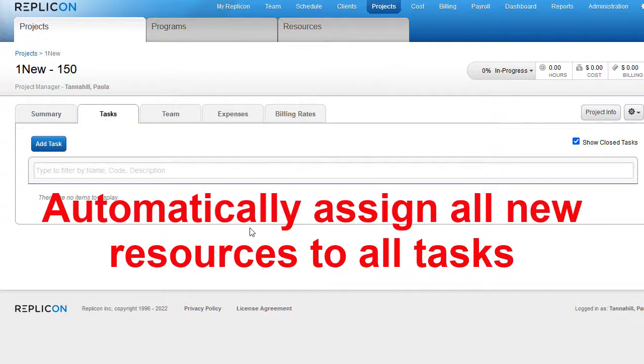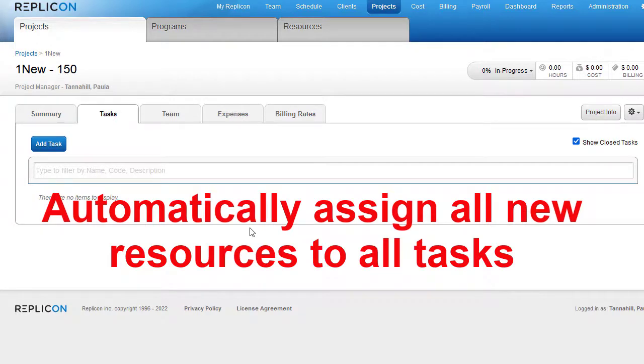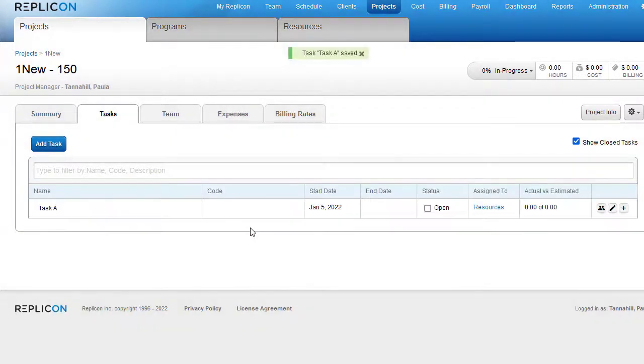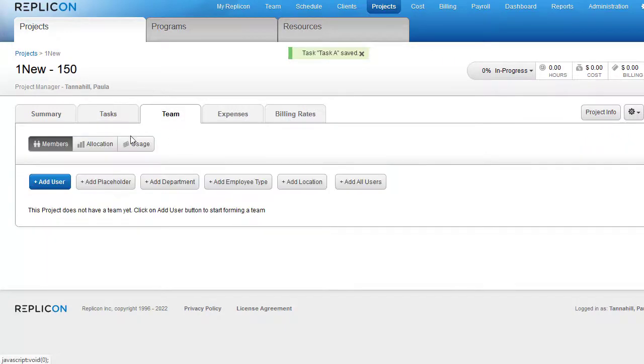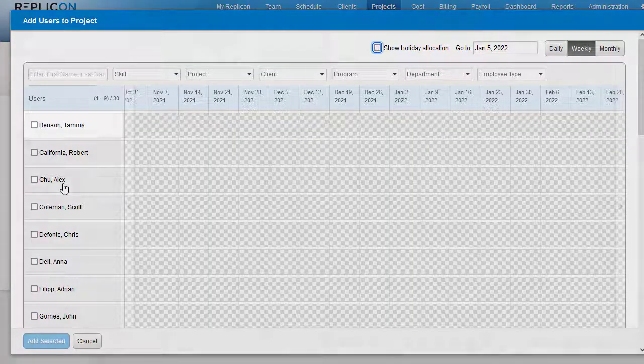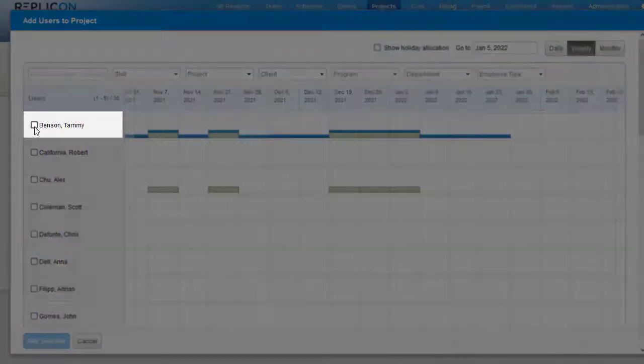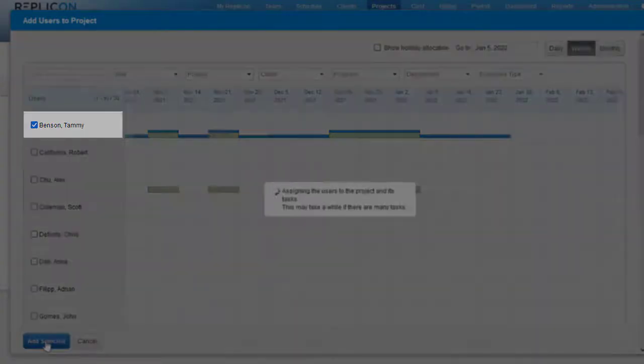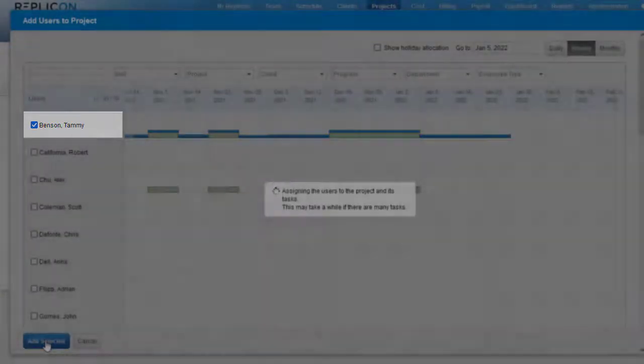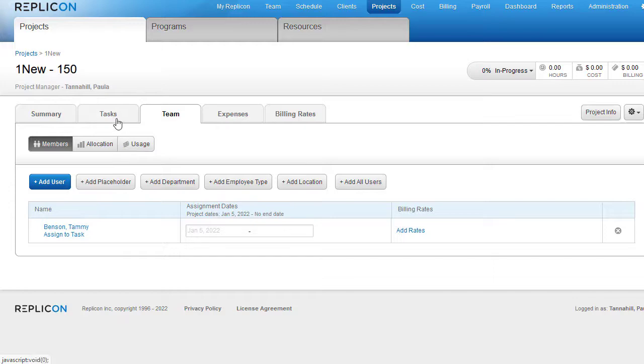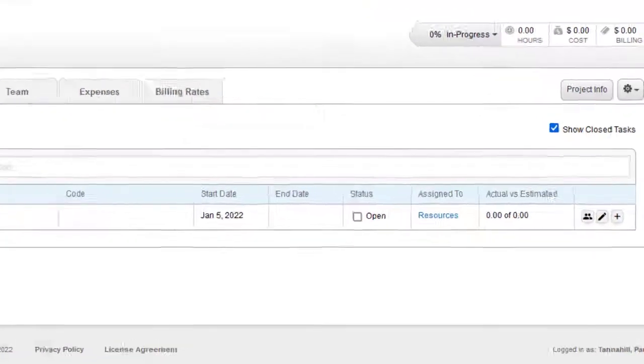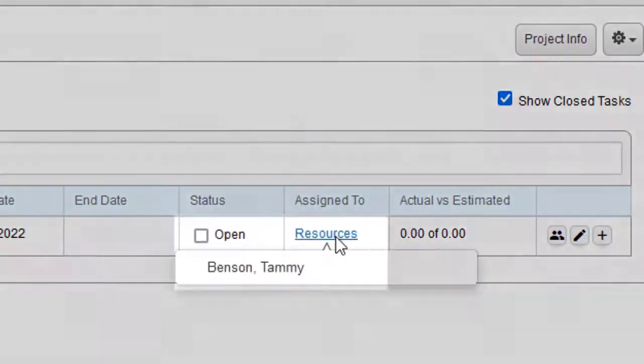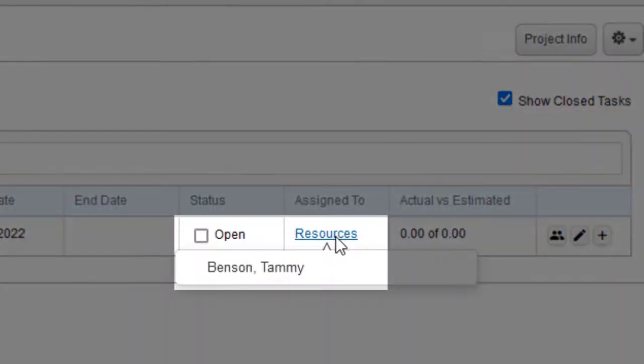This feature may also save you some time when setting up projects. Previously, project managers had to manually assign each newly added team member to relevant tasks, which was time-consuming, especially on large projects. Now, for each project, managers can choose to assign any newly added resources to all existing tasks. This ensures new resources can enter time against all of a project's tasks.